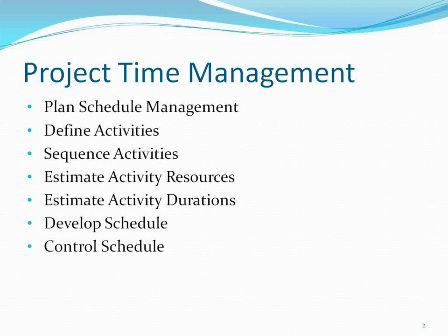For example, there is a work package called, say, producing a weekly report. It's a work package. So now, for this weekly report, what are the activities we do? We'll further break down into that. Okay, so that is called defining activities.